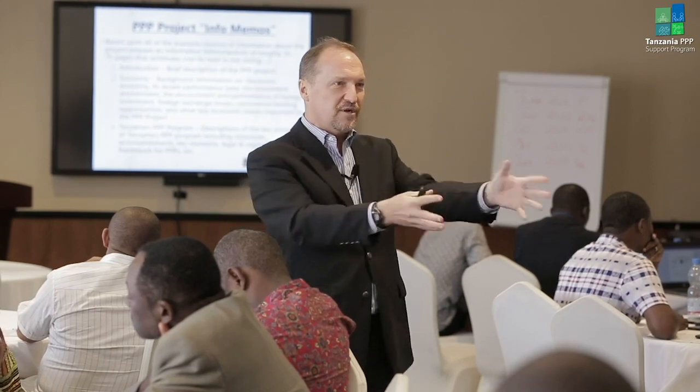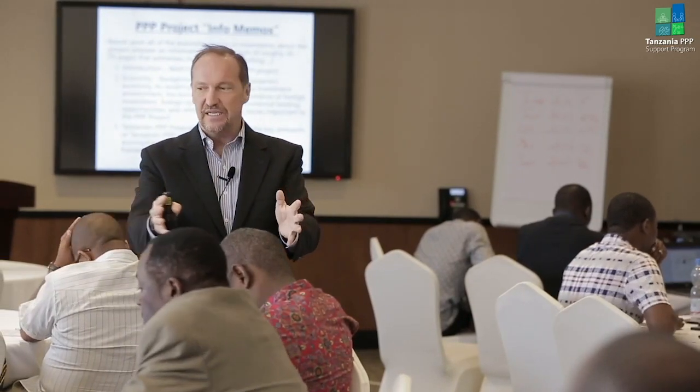We've identified that a new terminal facility would need to handle X number of passengers or buses, or about this amount of space. It may even include some rough estimates on some of the input costs, to provide an idea. But now an investor, instead of saying, well, you're only giving me a concept, like we need a bus terminal in this city, but there are so many unknowns, is now saying, we've studied it, and here is the required output standards of the project. And here's where your revenue streams can come from. And here's how much is currently being paid, et cetera. So they can make a more informed decision.